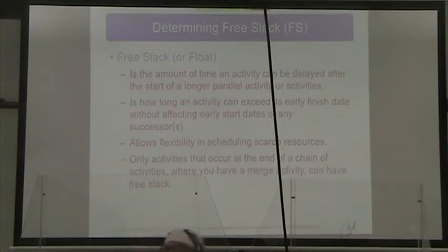So obviously, this lets us schedule our resources more flexibly, right? If 2 parallel activities need to use the same resources or facilities to accomplish both, then for the one with slack, we can say, okay, well, look, activity B here needs to use the laboratory for a week right up front.